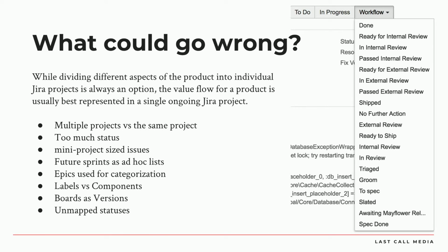So you have configuration for the components, and we're going to leverage that where we're going with this. But you don't want to use components like throwaway tags on an issue, and you don't want to use labels for serious categorization of project issues, because those labels are going to show up everywhere. But you can manage your components.